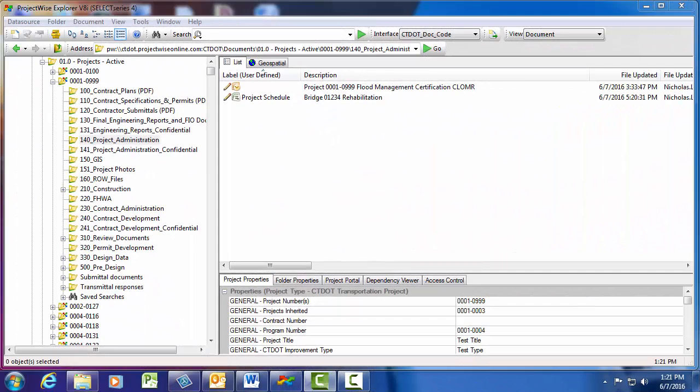It is essential that project managers can manage their project from one master schedule. This allows project managers to track all projects at once. It allows them to maintain all schedules from one location, and it enables single status report generation for all schedules. Projects inserted into a master project are called subprojects.